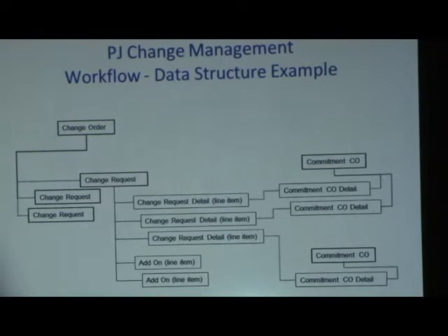This just shows that it can get complicated quickly: each change order can have multiple requests, each request can have multiple line items, each line item can relate to a different sub. So keeping track that request number 3 was approved on owner change order 1, and I need to issue sub change order 4, it manages all of that for you.